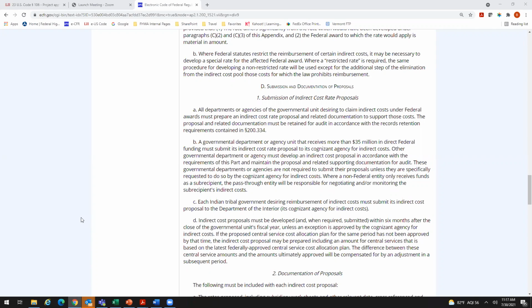Wouldn't that emergency event, if we charge that 10%, and whatever the cost or value of that emergency event was, let's say it was $20 million, if we just charge the 10% of that $20 million, it was never included in the original base, we would overbill our indirect costs. So we also need to think about that, because that could also be what FEMA is saying, and we do that in Federal Highway all the time.